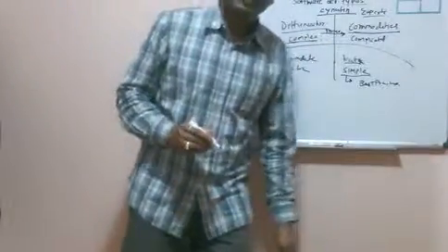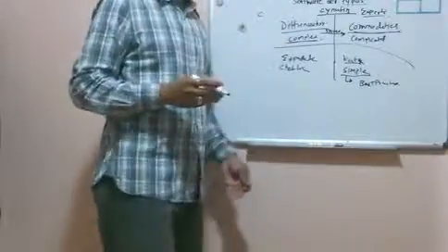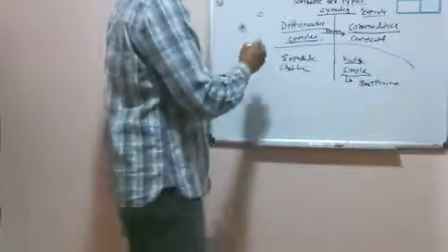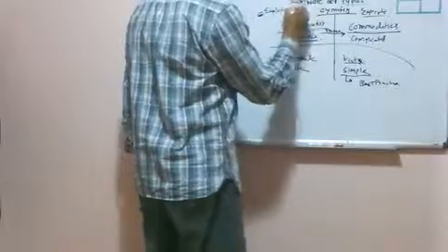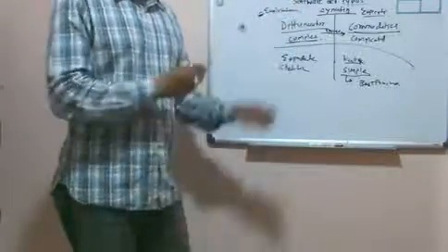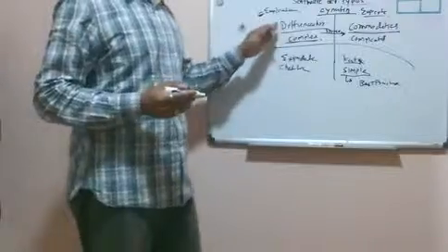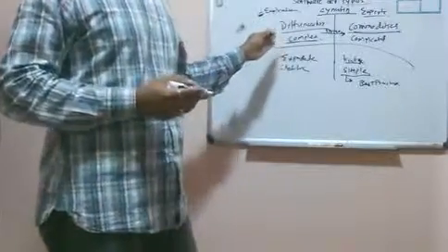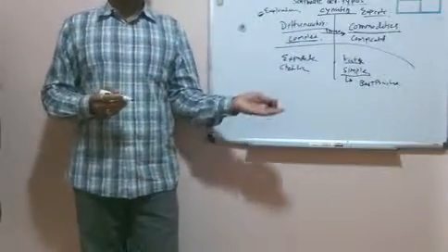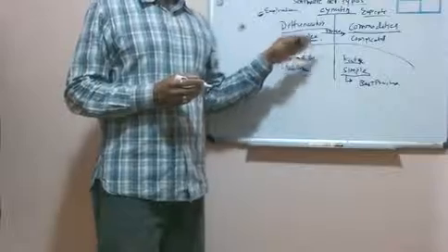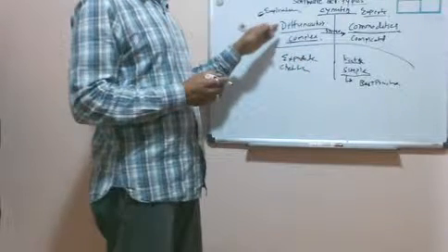The complex: in complex, we don't know the cause and effect, so we don't know what is causing it, and we don't know what will be affected. So here there is total exploration and chances of failure too. One of the important things when the project is in complex mode is to make sure the stakeholders understand and set the expectation that the project can fail, it may fail. So you want to make sure that project managers, stakeholders and sponsors know about this.